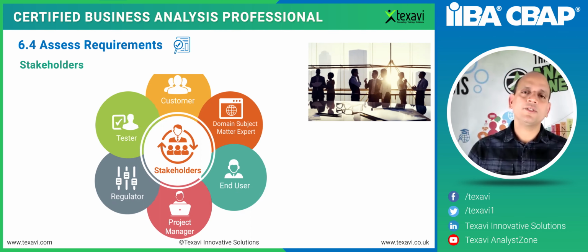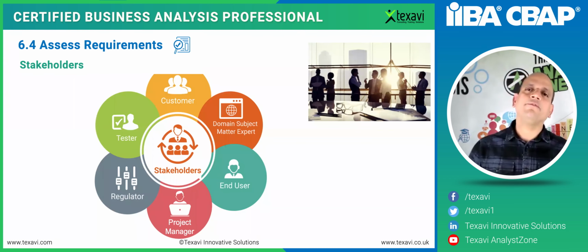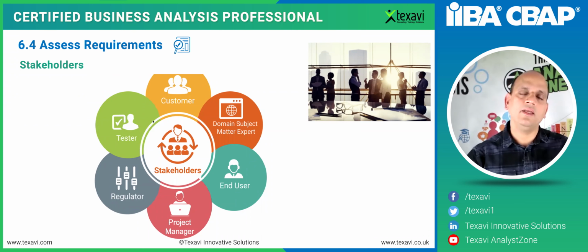It's humanly impossible to accommodate so many different changes coming in from so many different directions, and to incorporate all those changes into the build and then deliver it really quickly within the next 2 weeks or 3 months or 1 month. So we need to deploy a lot of automation, a lot of tools and technologies, so that we can do some of the things which can be done by the machines better and quicker. And the human intervention could be focused on the things which have to take decisions, for example. So that's why we deploy a lot of automation and automation testing and regression testing, integration testing within the agile methods, Scrum and Kanban and SAFe and all that.